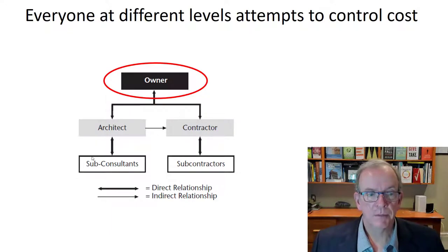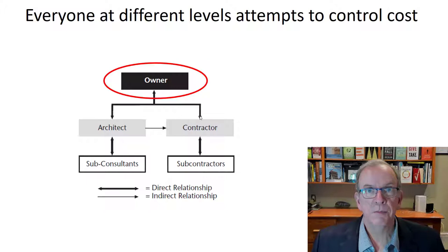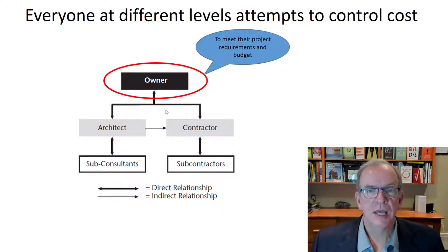If it's a lump sum, the consultants definitely want to be careful that it's not costing them more than they estimated. And then the same thing over here on the contractor side. Well, they have subcontractors, and they want to make sure that the subcontractors are not overbilling in any way, that changes and claims are being settled, and disputes are being clarified and settled into change orders, which of course would change the relationship between the contractor and the owner. So the contract amount may change, or it may delay the project, or both. So these are some of the interconnections that take place.